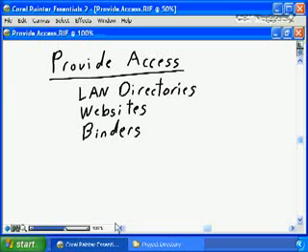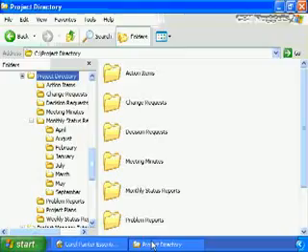One very effective way I found of doing that is simply to create a project directory on a LAN somewhere. Go out and create a shared folder on a LAN and start to build folders underneath that for all of the appropriate pieces of communications history that needs to be preserved, for action items, for change requests, for decision reports, and so on. You need to be able to store the monthly status reports for each month that your project has been actively delivering. You need to store the problem reports, the project plans, the weekly status reports, and so on.